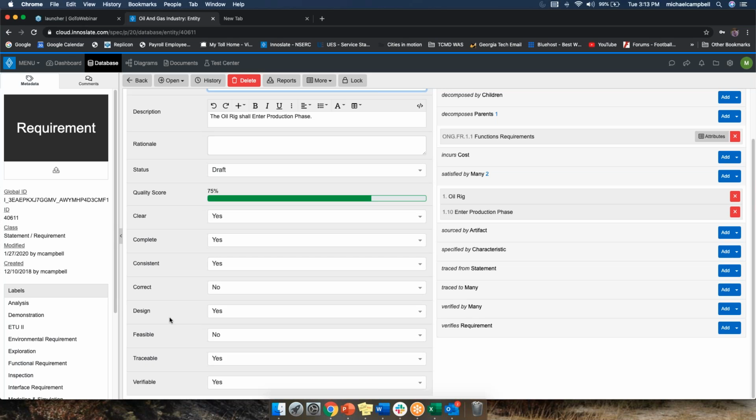So if we're talking about a requirements baseline, essentially what you're going to want to do is capture that engineering change proposal and then create the new baseline. Once you create the new baseline, anything that's changed after that is basically a new requirement and a new set of baseline requirements. Now, if you do have an engineering change proposal come in and it's approved, and you want to implement that, then the best thing to do, once you've implemented that proposal and changed the requirements to meet it, is to baseline those requirements and give a justification or some type of decision point as to why.